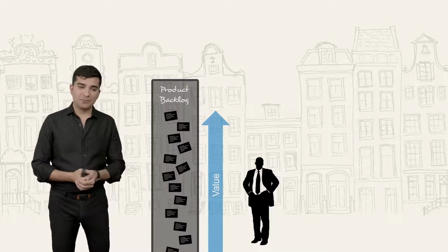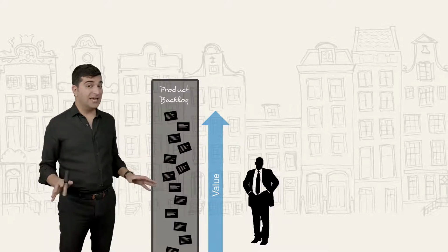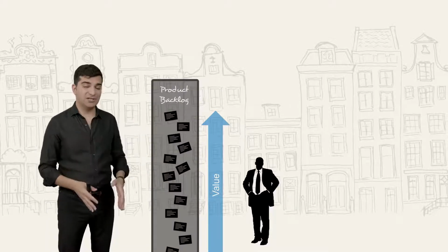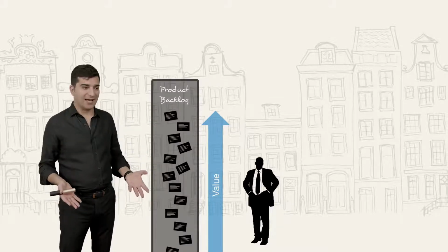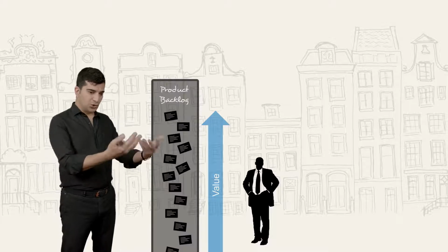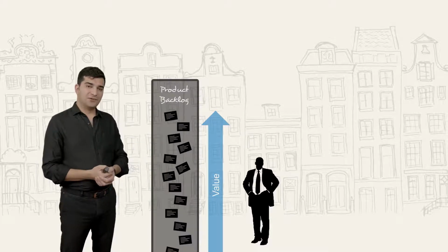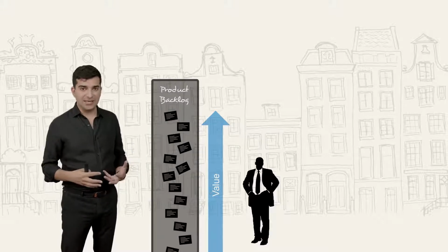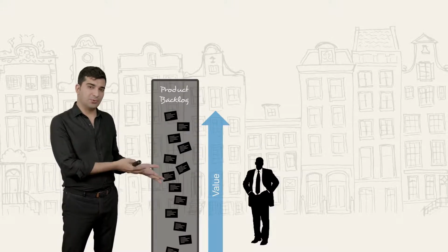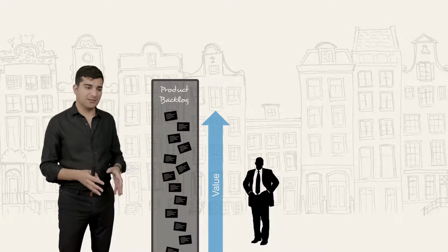So in the beginning of the project, you don't spend weeks creating a complete product backlog. We never have a complete product backlog because we are always showing the software to the end users and to the customer, and we receive new ideas, and those new ideas will go to the product backlog. We don't want to fix it.